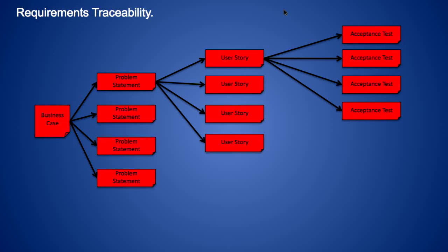At the very start of this process, we begin what we describe as our ideation period, where we've taken our business case, broken it out into problem statements, picked off the most important problem statement, broken that out into user stories, and are starting to have a conversation with the customer to define what the acceptance criteria are for that user story to be considered complete. Then work begins.